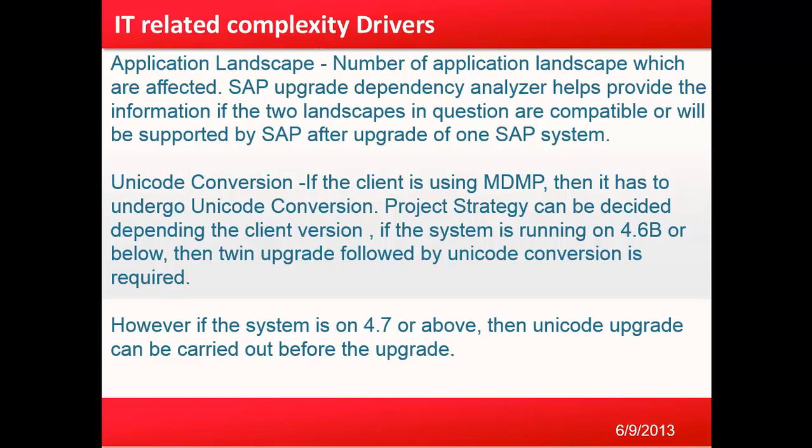One key IT-related complexity driver is the application landscape — the number of application landscapes which are affected by the SAP upgrade. The SAP Dependency Analyzer helps to analyze whether the two landscapes in question are compatible or will be supported by SAP after the upgrade of one system. We need to review whether dependent components will be impacted or not.